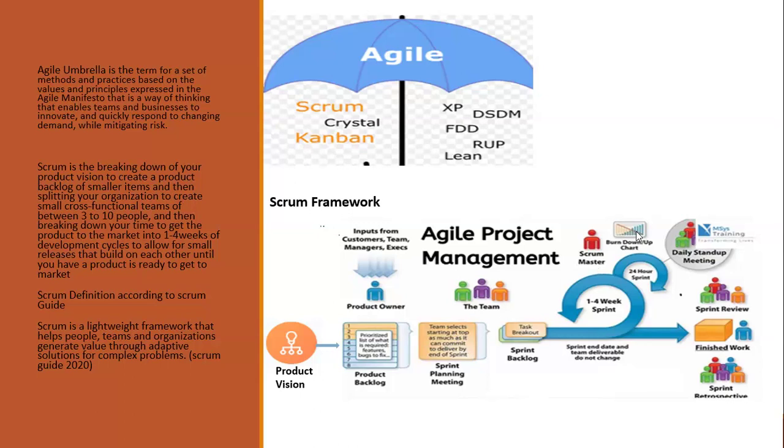And during product backlog refinement, three things are meant to happen, right? One of them is description. Developers need to add a description to each of the selected cards. The next thing is you must order the backlog, telling us what is going to be built first. Then the development team will size the user stories with the selected product backlog items into this sprint backlog, right? So these are the steps you follow to deliver a Scrum project.